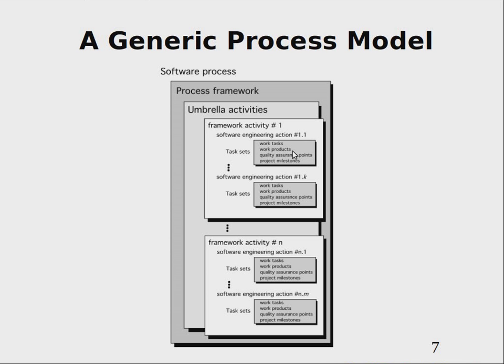Usually you do not split a task into something smaller. There may be tasks containing other tasks, so some task can be a container for other tasks, but usually a task is the smallest unit of manageable things in different kinds of methodologies.